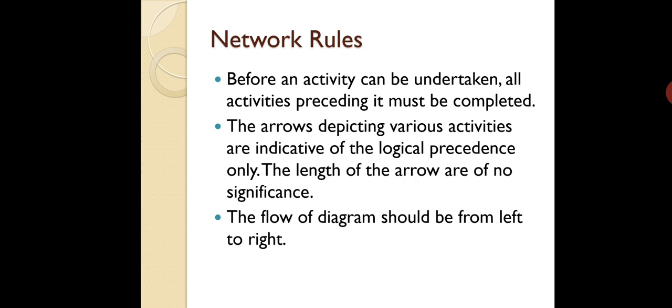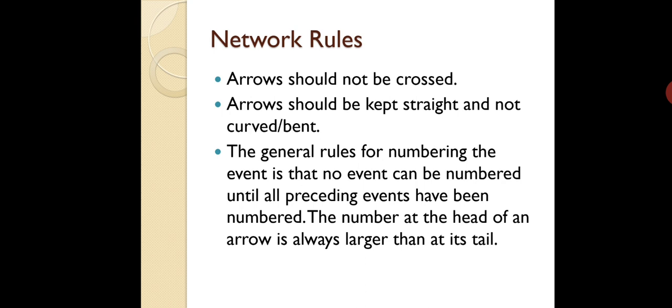The flow of the diagram should always be from left to right. It cannot be upward, cannot be downward, cannot be from right to left. So whenever you construct a network, arrows should not be crossed. Arrows should be kept straight, and should not be curved or bent.